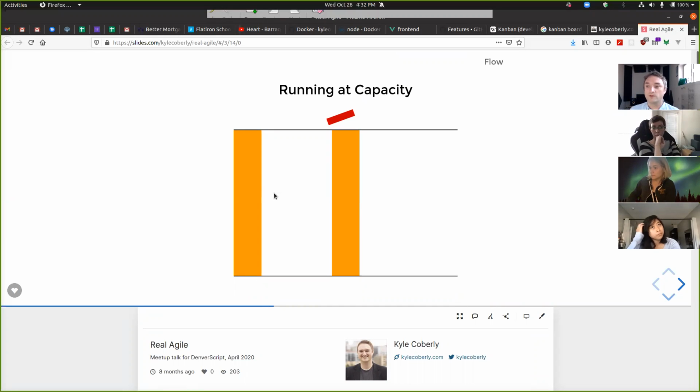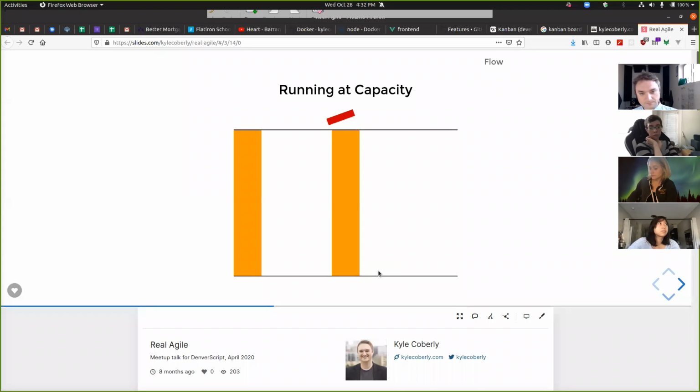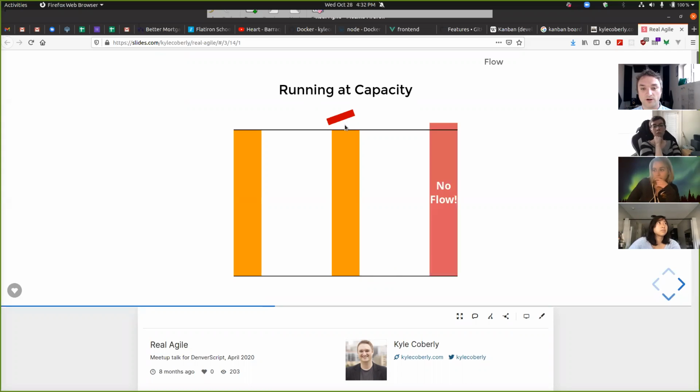And the problem with keeping everybody running around the clock, which is our push approach, get the work off your plate as quickly as you can. Couple things. The first one is that if everybody's running at capacity, a completely natural variation, like adding an extra piece of work, now jams the entire system. You're working on all of those things at once, and so nothing can get through.